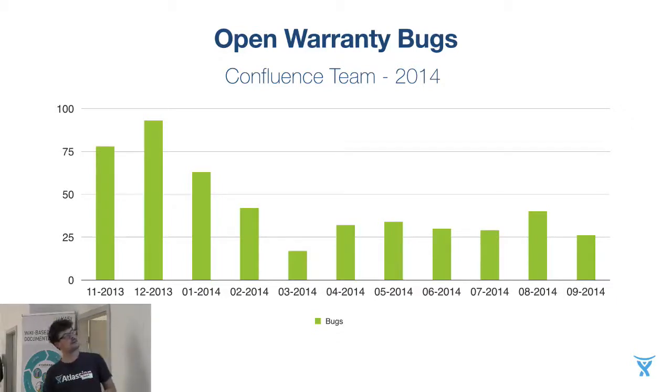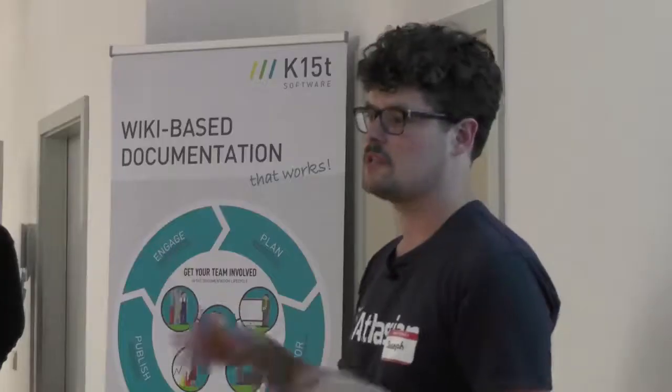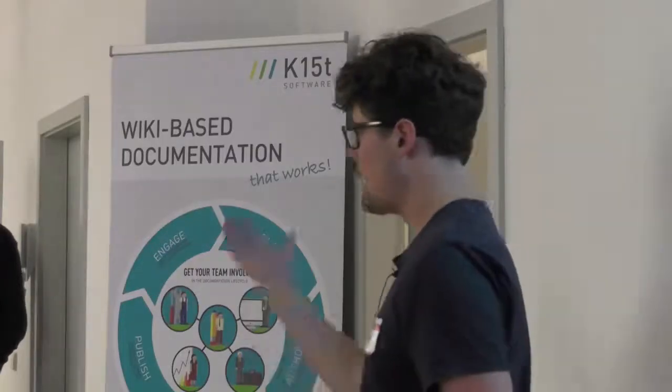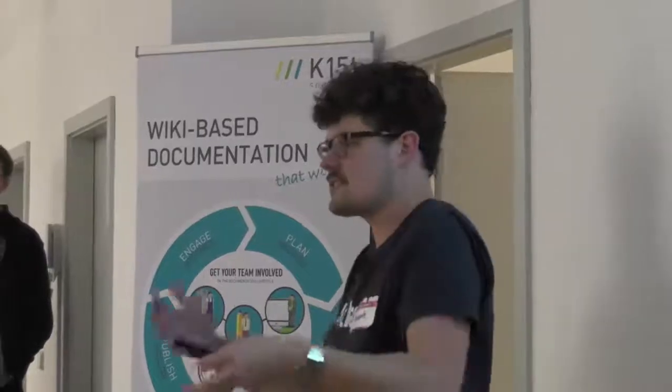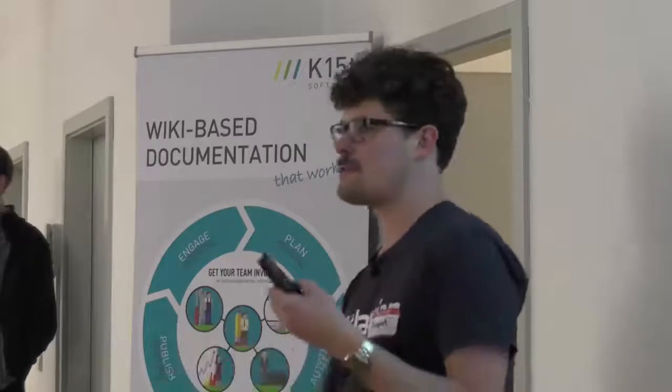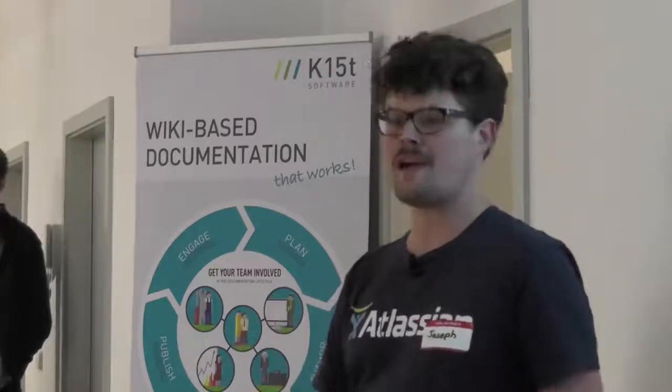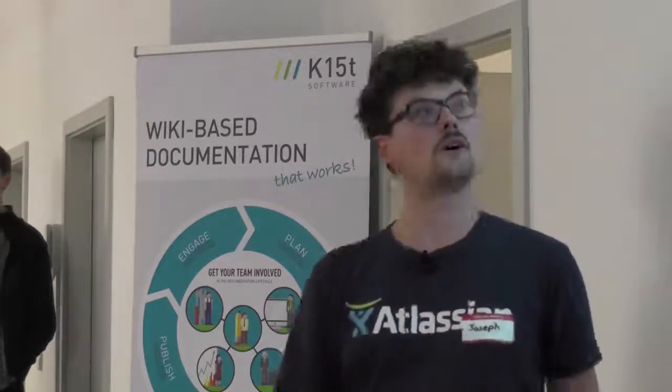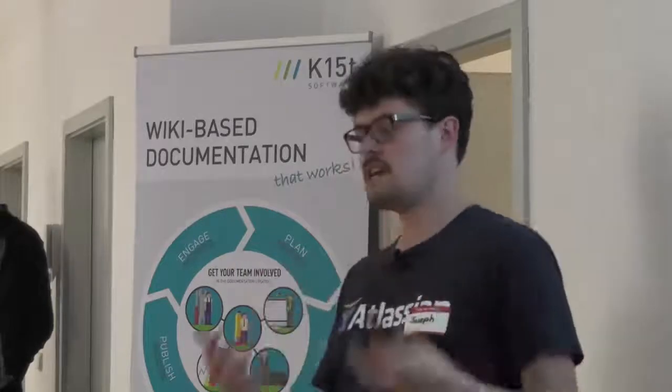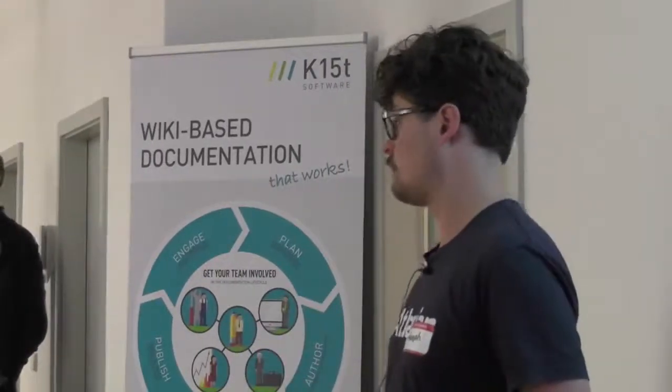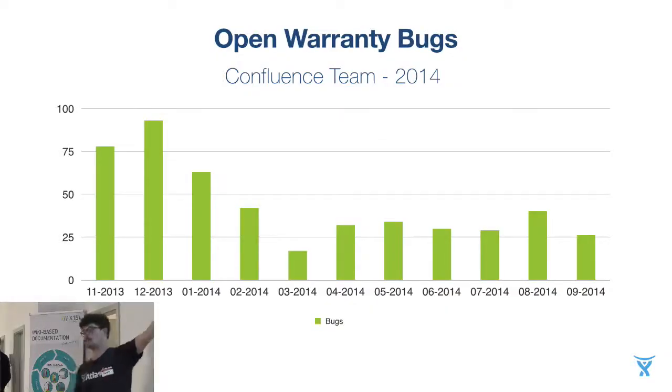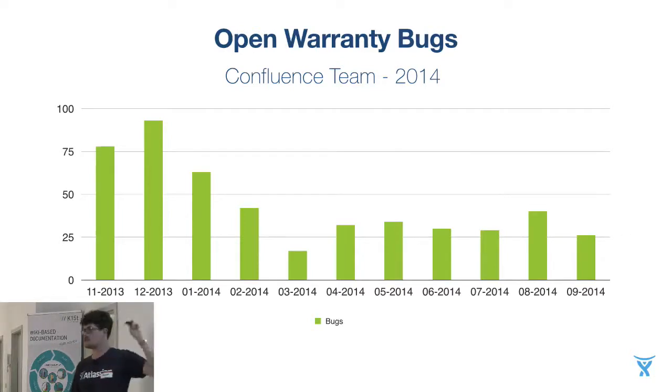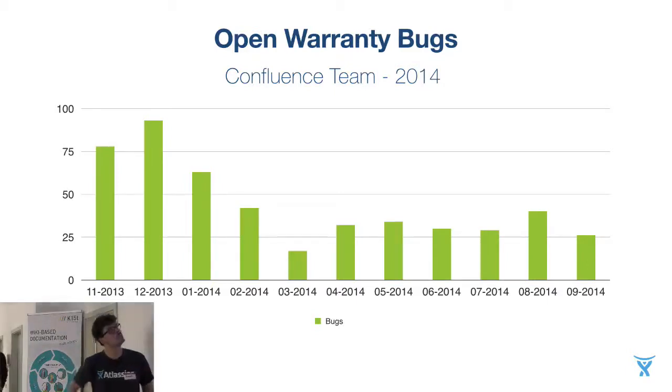And the reason this happened is that it's one thing to actually say, this is the policy now, we're doing feature warranties, everybody accept it. But that's only half the story. The other half of the story is that it takes time for people to adapt to process changes. And that really can take a little while for people to warm up to the fact that, yeah, this is really happening. It's not going to go away. We actually need to work on this problem. And so it took about three months, and then we started seeing results. So the goal for the Confluence team is actually 20, the threshold at which you should aim to have no more than 20 warranty bugs. So once we set a goal and started working on it, we actually started making measurable progress towards that goal.